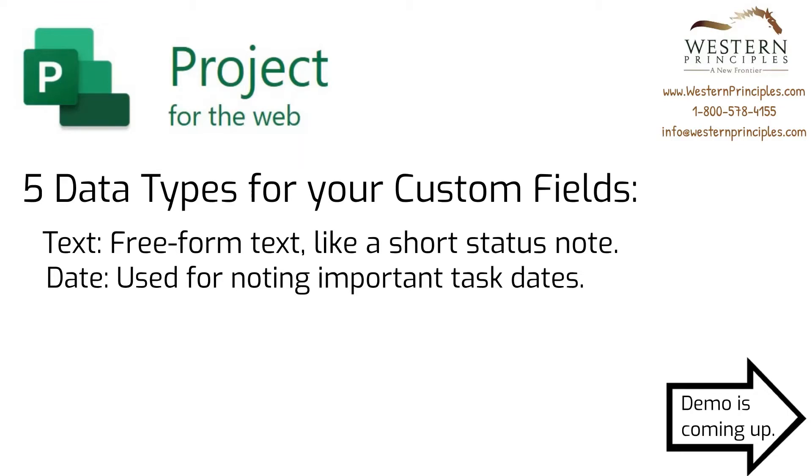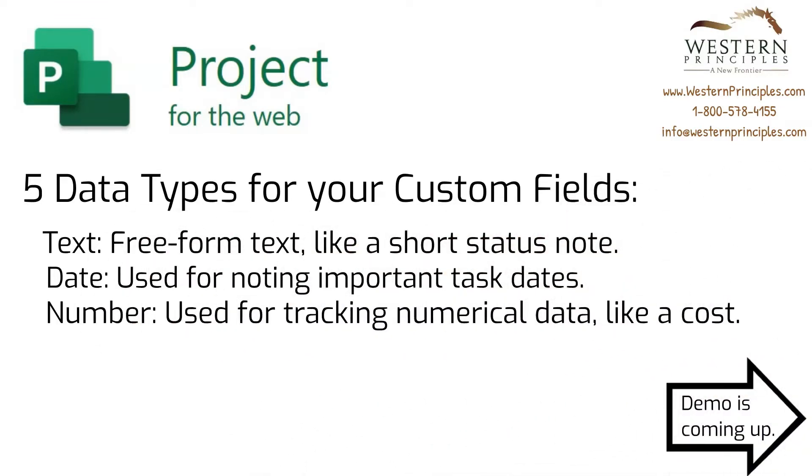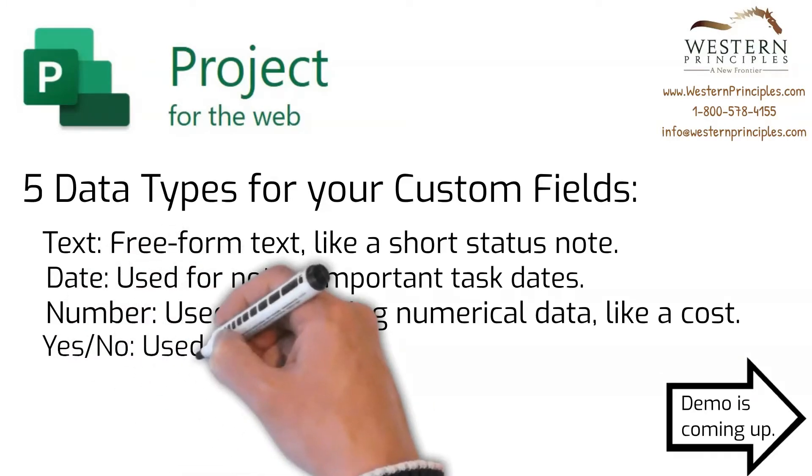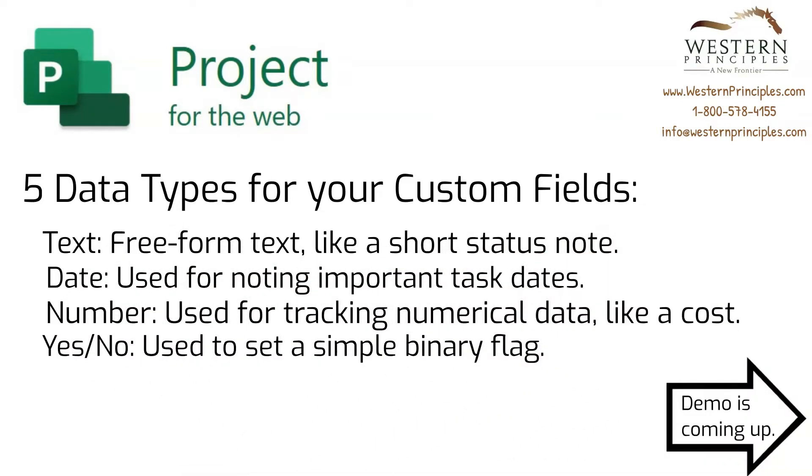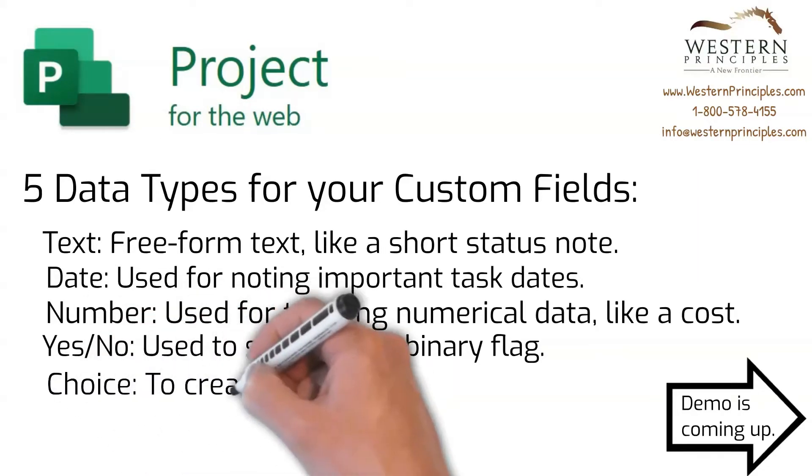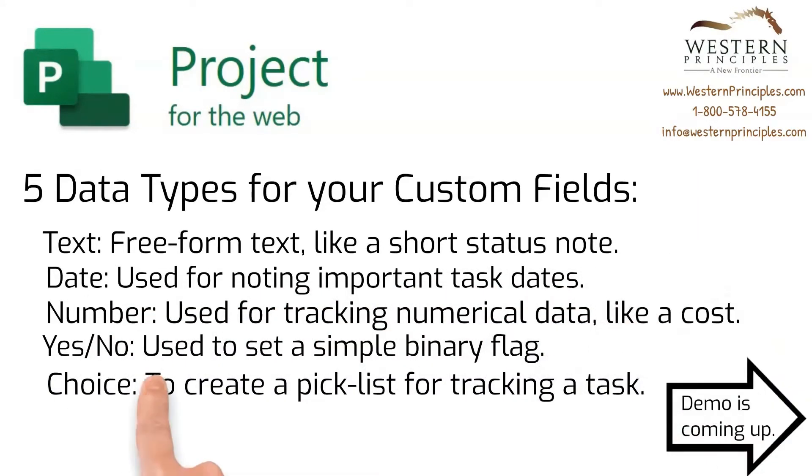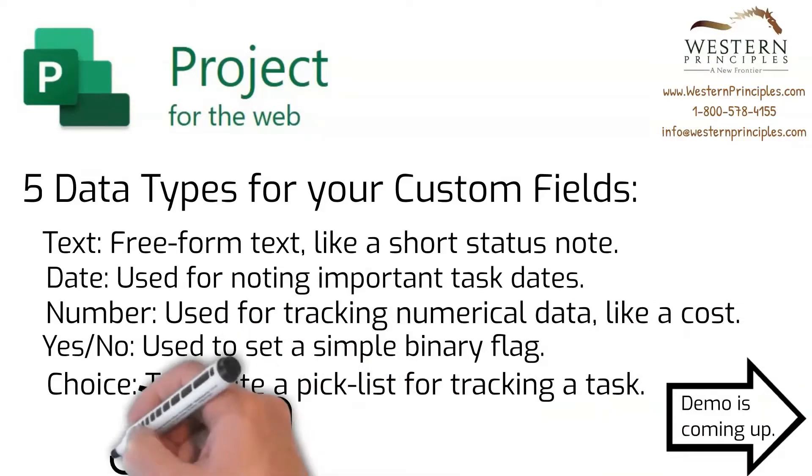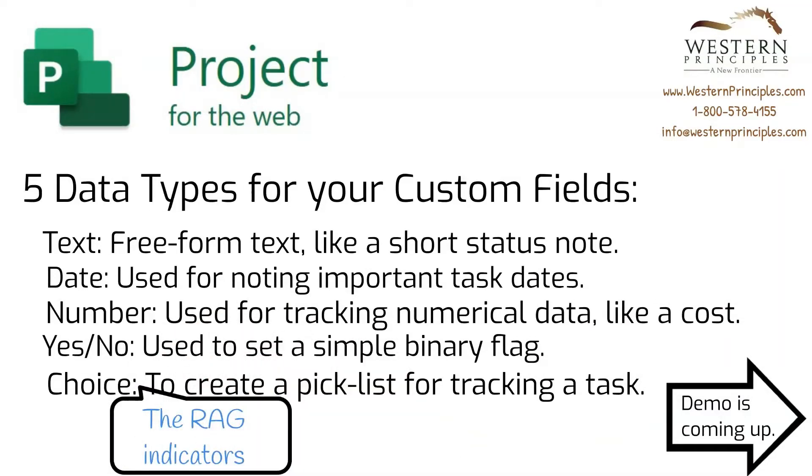The number field is used for tracking numerical data on a project, for example, the task cost. The yes-no field can be used to set a simple binary flag, for example, if the team has reviewed this task and agreed to it. Finally, the choice field gives you the ability to create a pick list that you can use for setting your RAG indicators.